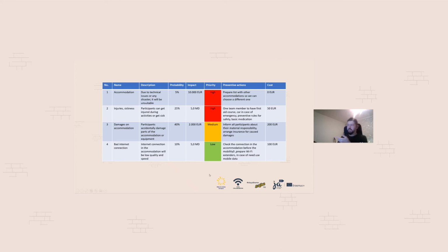With some of them you decide to deal, and with some of them you don't even decide to deal because there is no impact and low probability, so you are not dealing with that. But you have the list of methods for how you can prevent it, how you can avoid it, or what to do when it happens. Then you will deal with it when it happens, like actively accepting the risk. Otherwise you will list them, and of course always deal with the high priorities, then the second or medium priorities, according to the management of the risks.